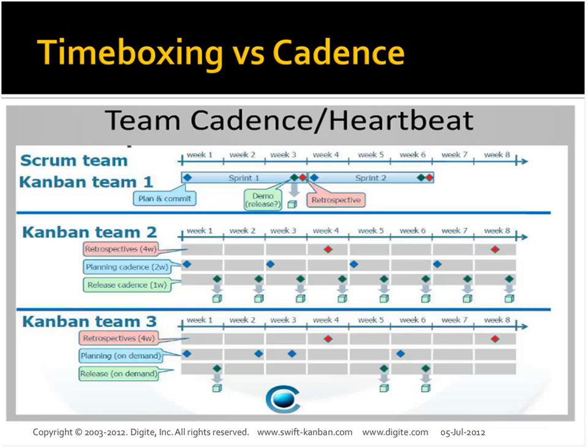So it brings in a different connotation to time boxing, even though it could be a little time boxing. Some of the teams which we have seen, in fact, don't even have any time boxing as such. They could also say that every time we have 20 cards done, we will make an iteration. So that becomes an internal iteration that could go through the next set of the value stream, rather than waiting for a fixed time period, because things might change. You might add a different card which is of higher priority, and therefore you can no longer just stick to a very hard schedule that way.